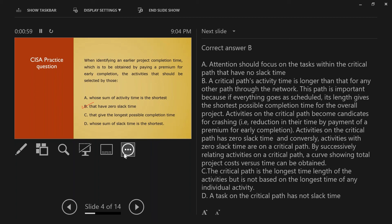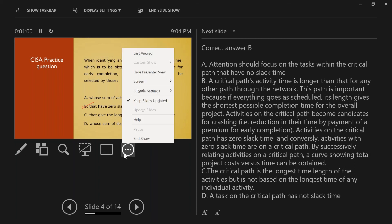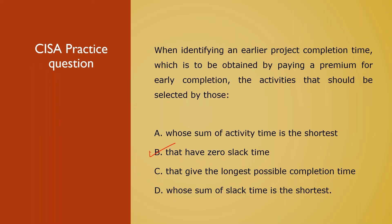Understanding the concept behind the question is very important — this is more about applying the concept you have learned. Every question is concept-based with a scenario built around it, and you are supposed to make a decision based on the options. Option C is not right — the critical path is the longest-length set of activities but is not based on the longest time of an individual activity. The task on a critical path has zero slack time. So B is the right answer for this question.